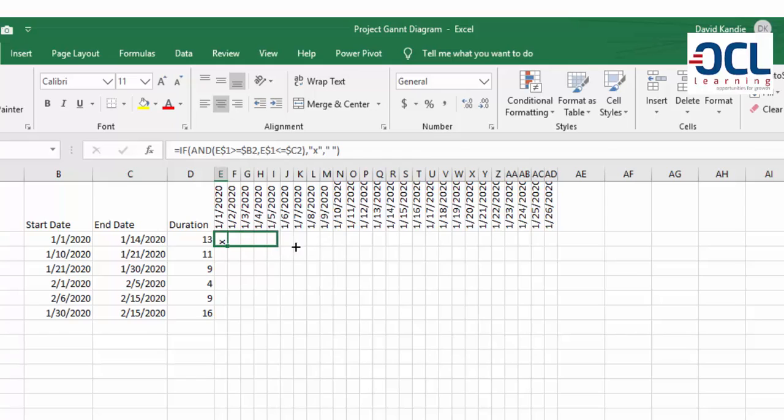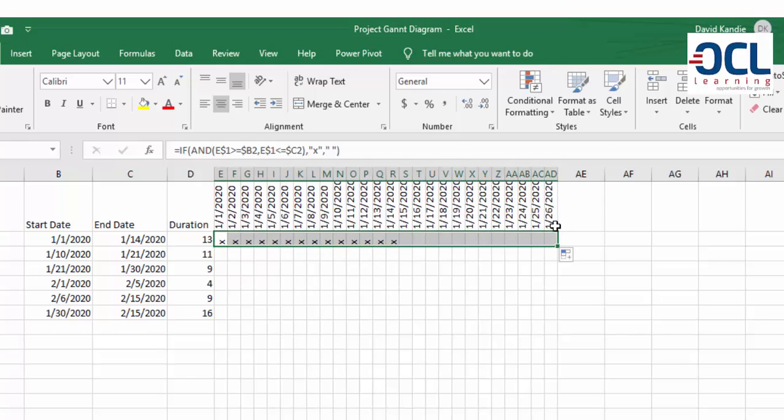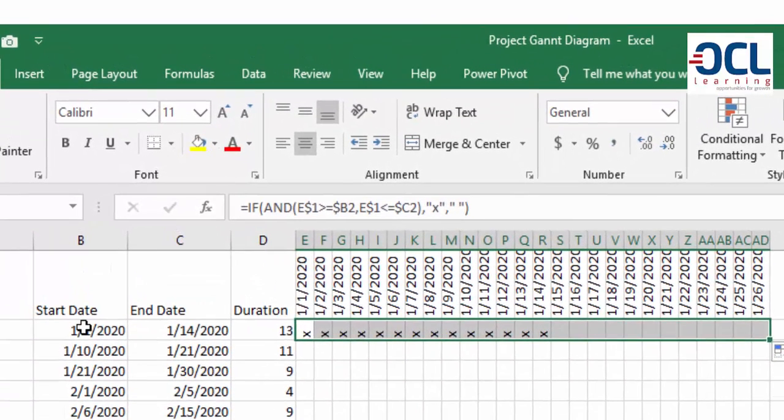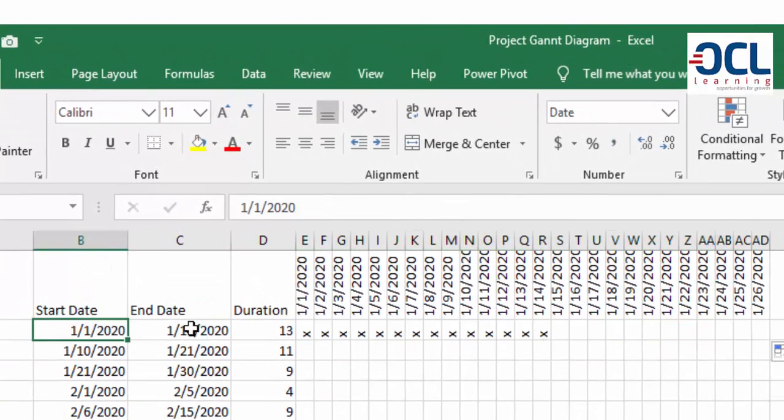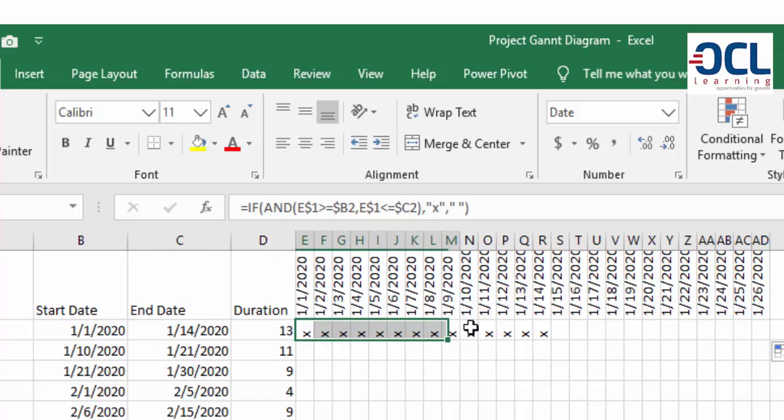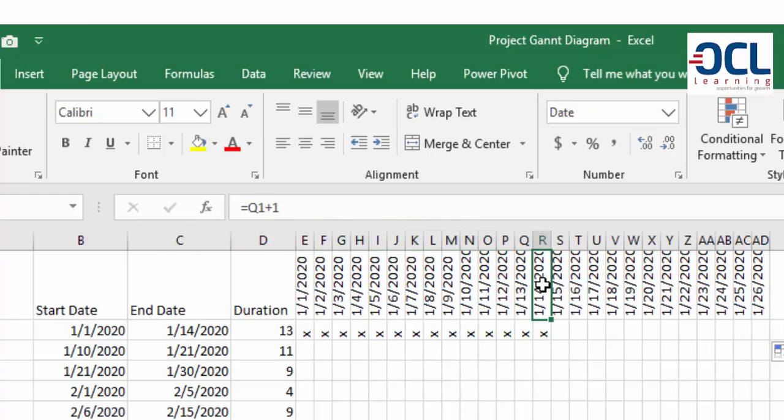Then I'm going to drag it to the right. So between the start date and the end date which is first date of January 2020 to 14th January 2020, you realize that X is only marked up to 14th which is this date.